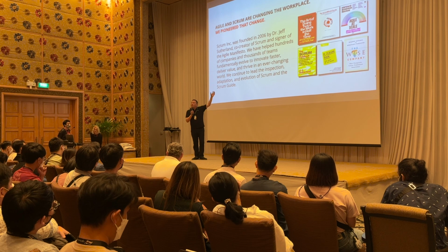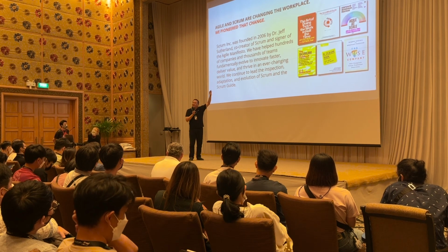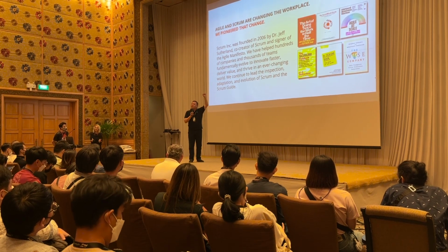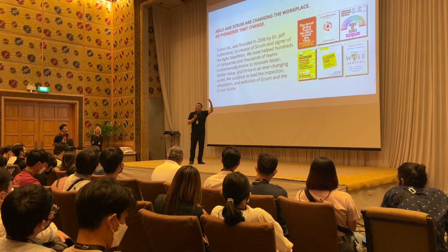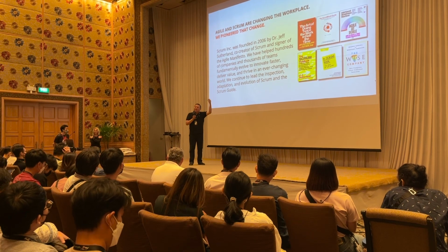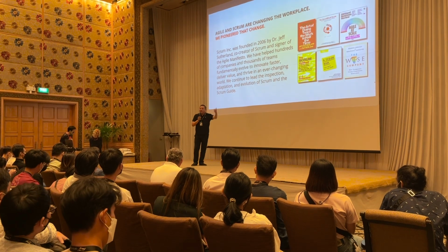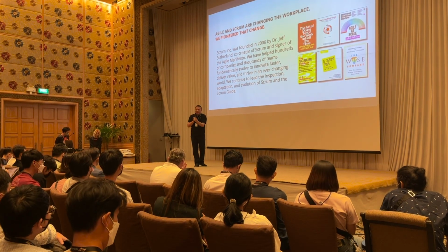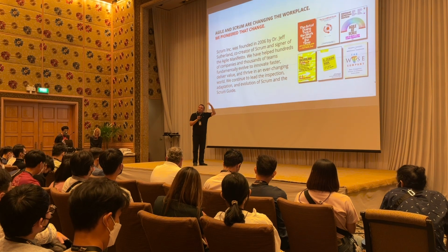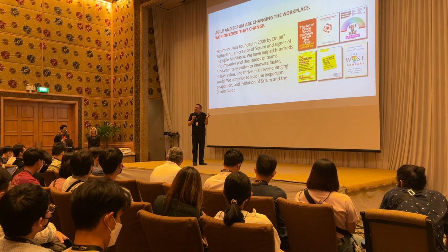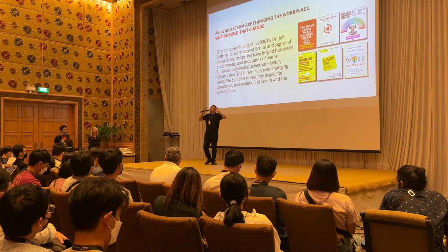When you receive a requirement, maybe in the form of a user story, right? You need to hand off from the UI team, and then after they are done, you hand it off to the second team, the third team, the fourth team, and the fifth team. You generate so much handoff that your speed is slow, right? And because you're generating so much handoff, once some problem or some bugs occur, nobody says, hey, it's my bug.